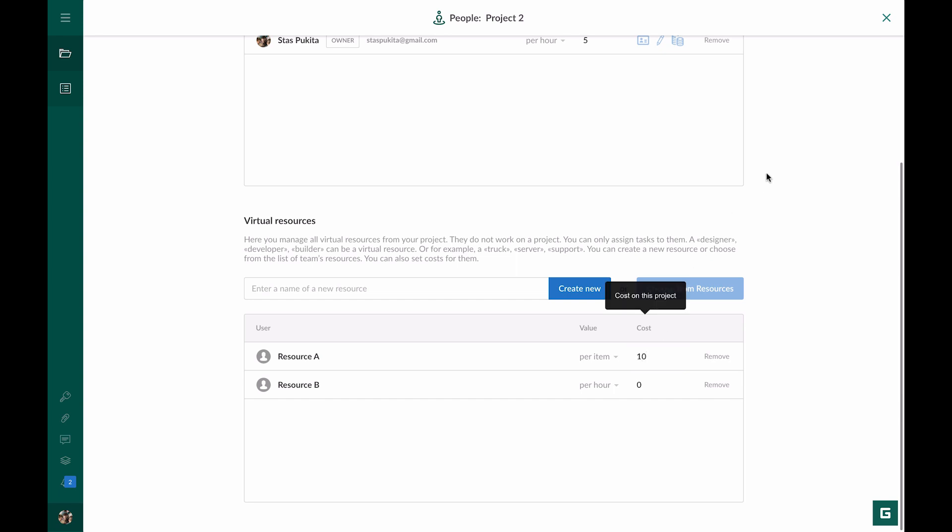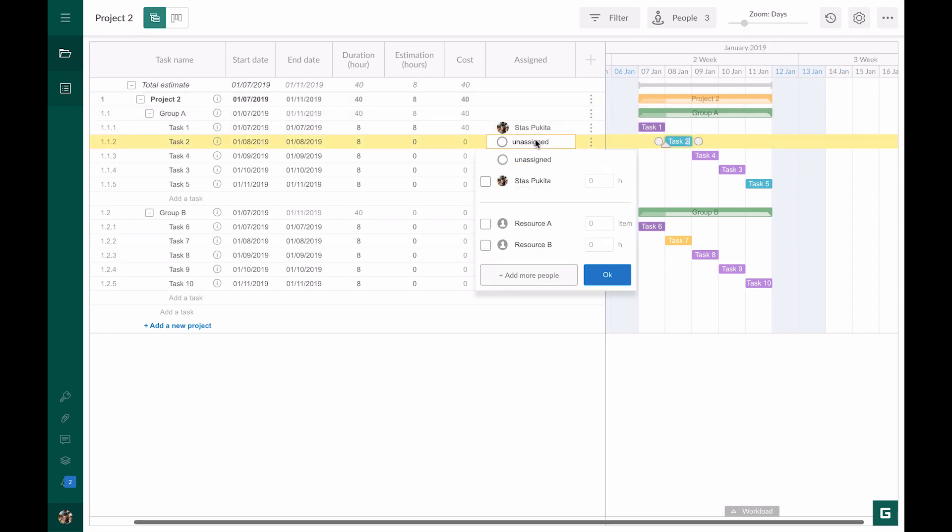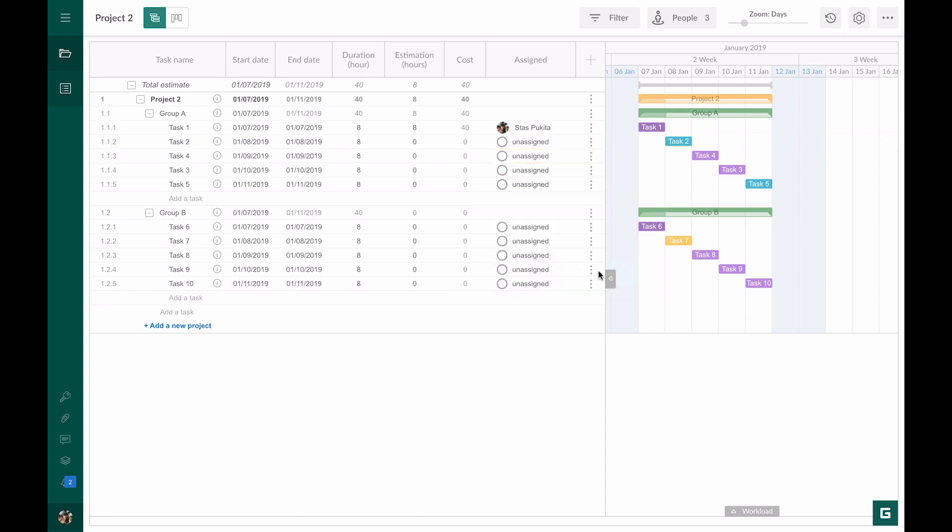We go back to our project and assign Task 2 to Resource A. Let's say we need to use five items for this task. In the cost column, we see 50. This is the result of multiplication of five items by $10. Please note that in this case, the duration of the task does not affect cost calculation.